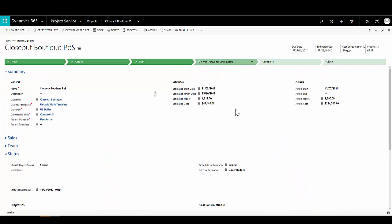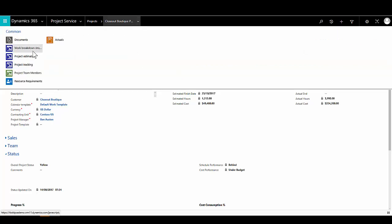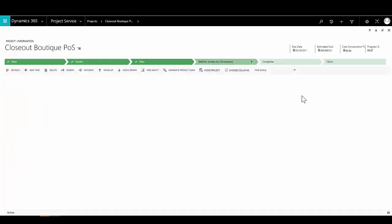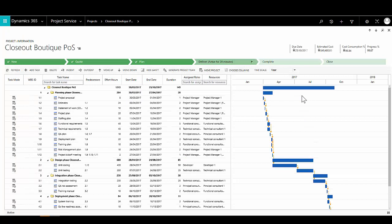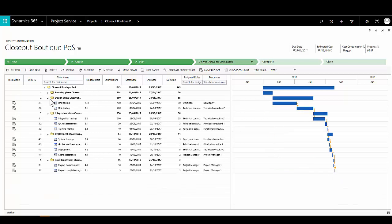The next area is the work breakdown structure, where we can plan the activities needed to complete our project and assign roles and individuals to those activities. Here we can see a familiar Gantt chart. On the left-hand side is a list of all activities in the work breakdown structure, each with a unique identifier organised in a hierarchical structure covering the project and individual phases within it.